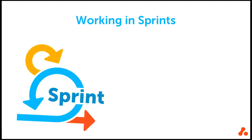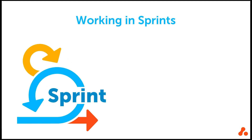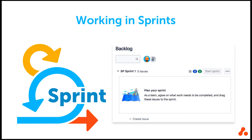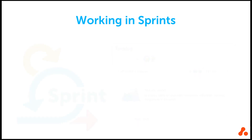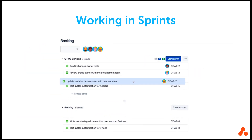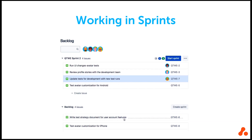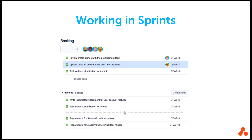A sprint is a container for all of the work a team decides to do for a specific time period. Once you have plenty of issues in your backlog, you can build a sprint. A Jira Scrum board automatically includes your first sprint ready for you to update with issues. To build your sprint, all you need to do is drag issues from the backlog or create issues directly in your sprint using the Create Issue link.